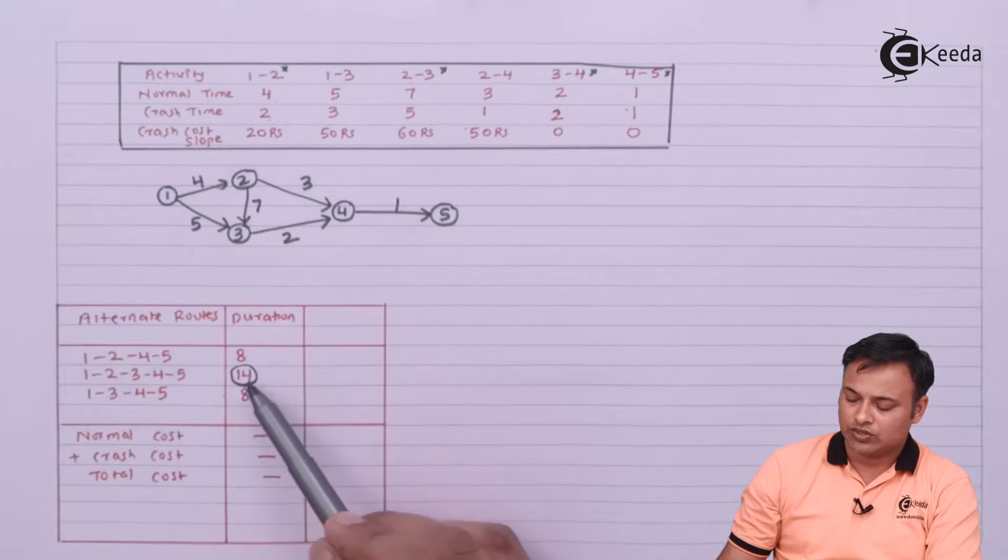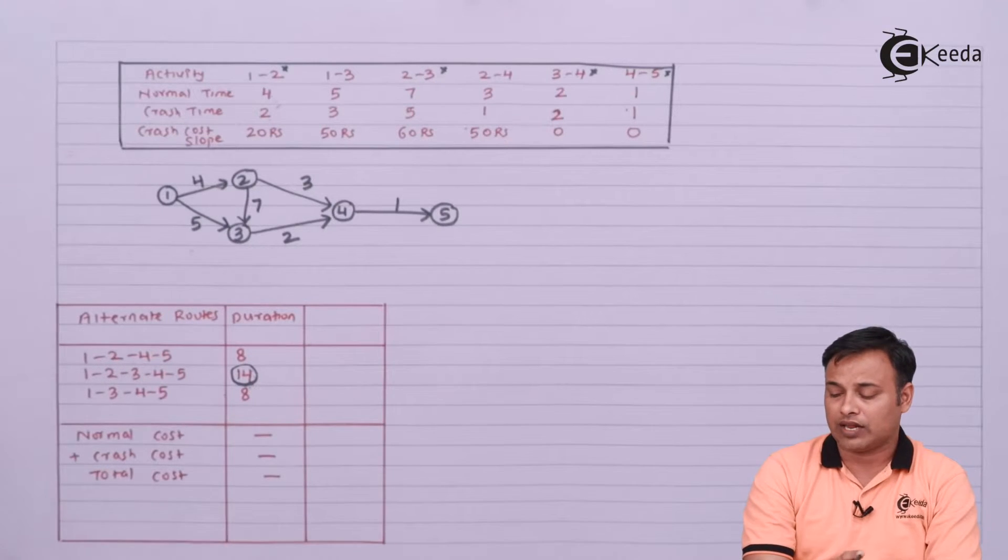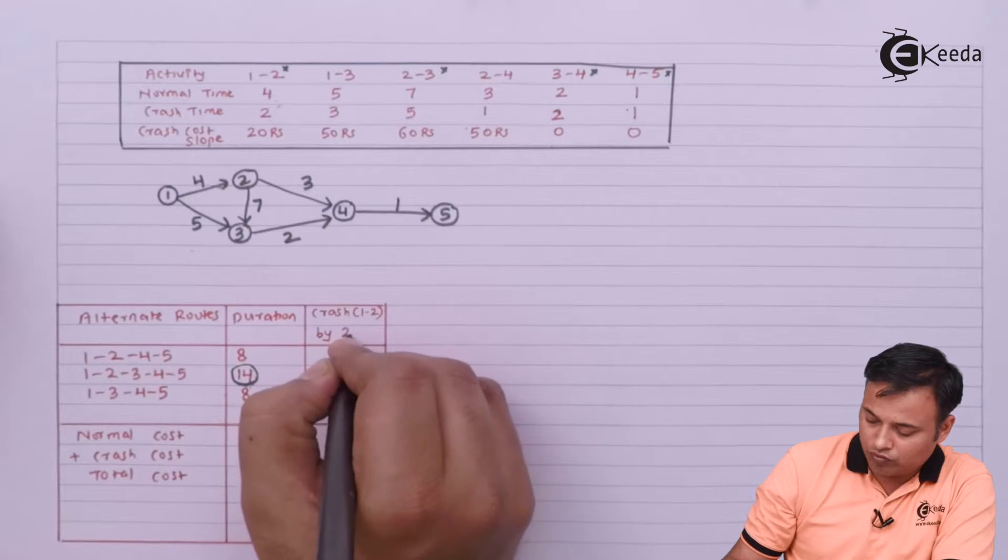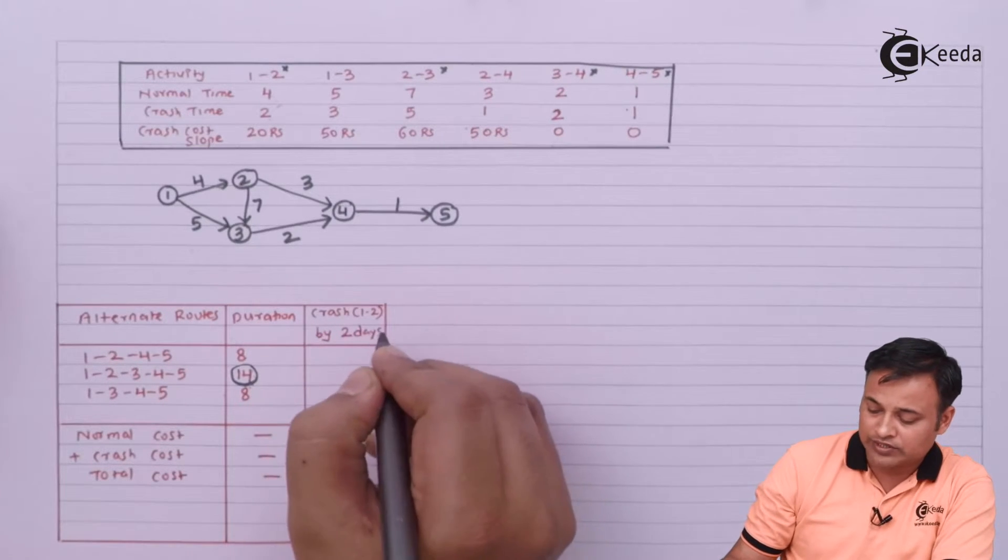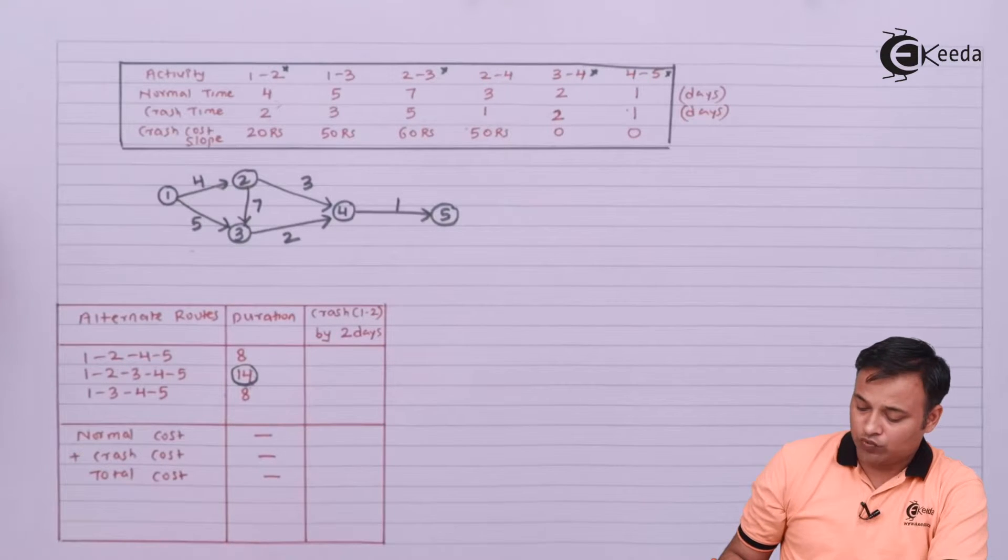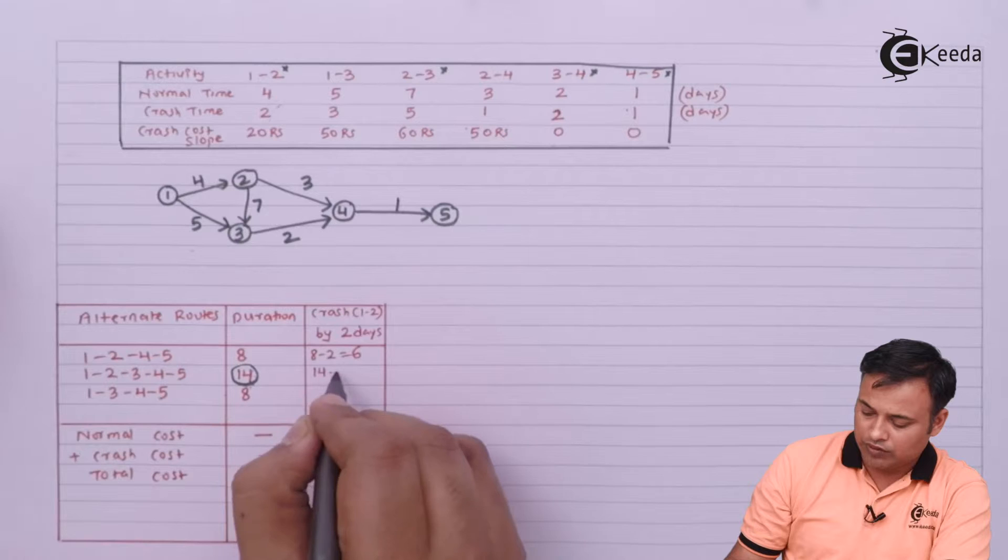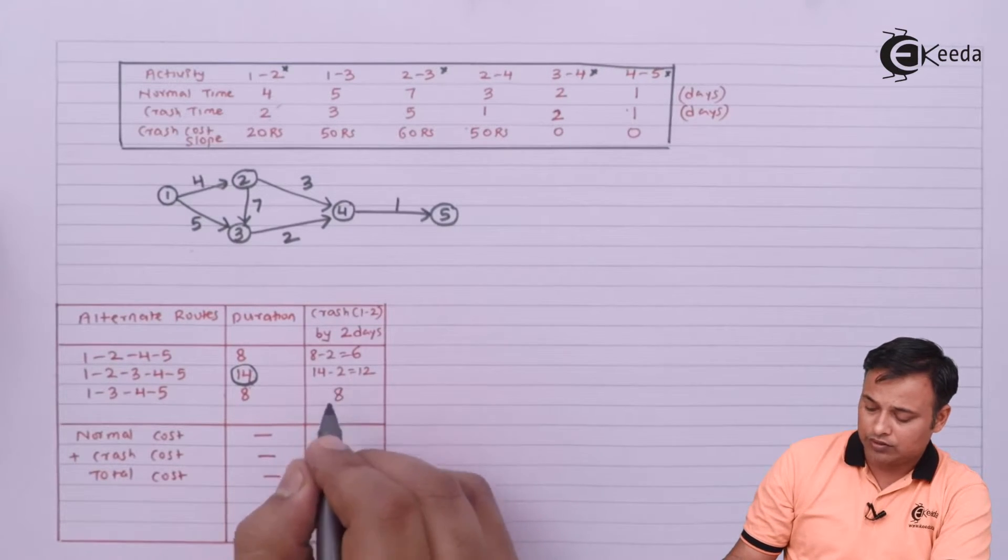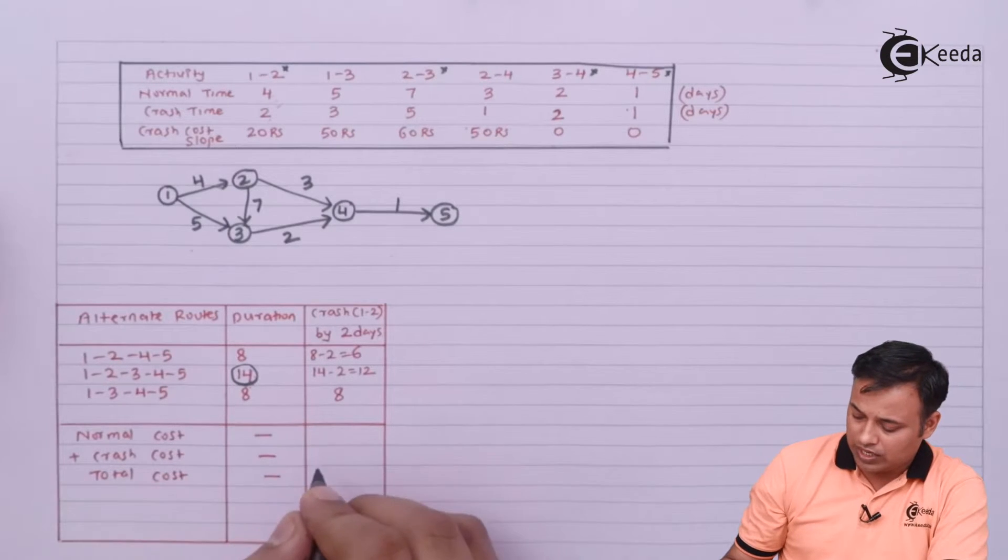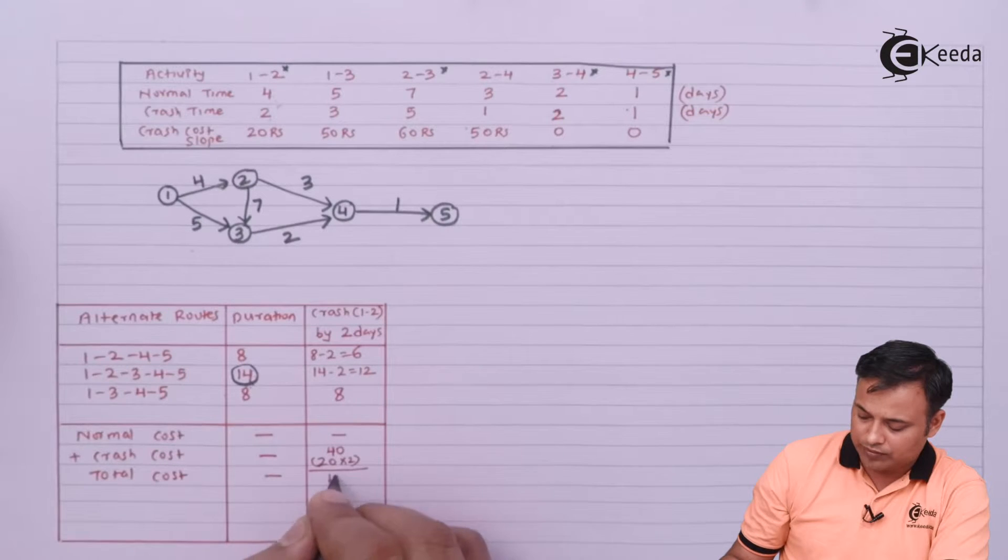The next highest number is 8, so the difference is 6. So 6 or 2, whichever is less will be our crashing. So I will crash 1-2 by 2 days. Let us assume these are days. So I will crash 1-2 by 2 days. It will become 8 minus 2, which is 6. This will become 14 minus 2, which is 12. So crash cost is 20 rupees per day, for 2 days, so my total cost will become 40.